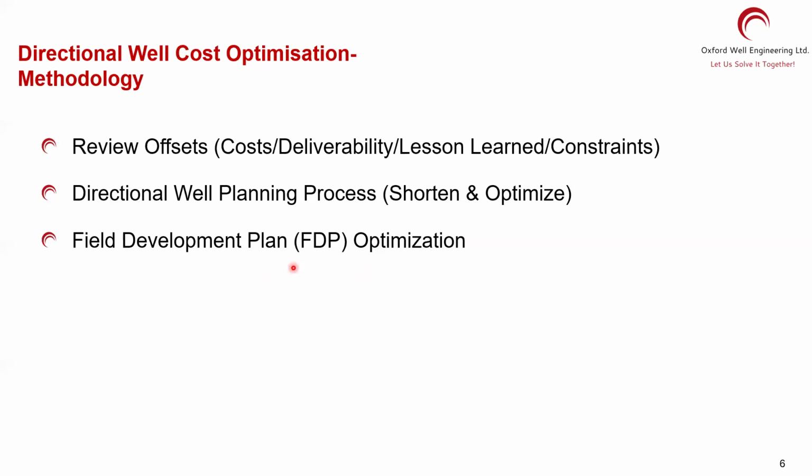If you are going to be drilling 30 similar kinds of wells, or 20 similar types of wells, apply the learning to each type in the other wells, so that when someone picks it up, they have somewhere to start. They already have a semi-optimized plan for each of these wells.